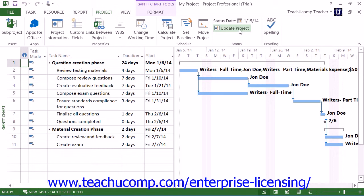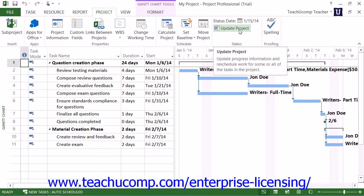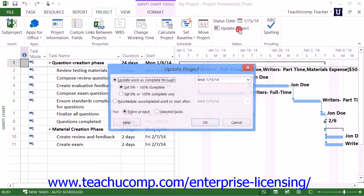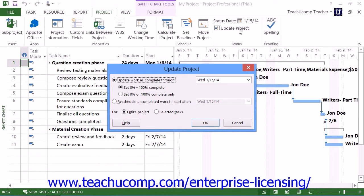To update multiple tasks in a project as of a selected date, click the Update Project button that appears in the Status button group on the Project tab in the ribbon. In the Update Project dialog box that appears, select the Update Work as Complete Through option button first. Next, select the desired date to mark the work completed through by selecting the desired date from the adjacent calendar drop-down arrow.